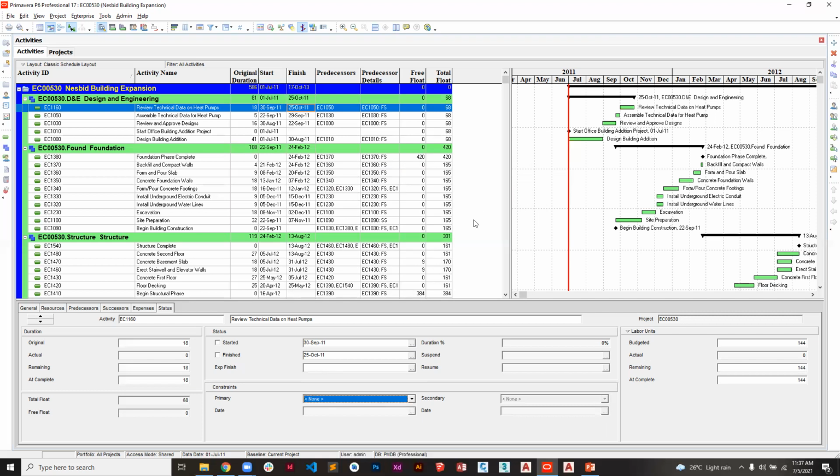Maybe what you should know is that these activities are interconnected, like they are depending on each other. The moment I put a constraint on one of the activities, it's also going to affect others that depend on it, unless it doesn't have dependents. For example, this activity was supposed to take 5 days, but now I put a constraint and it must be finished in 3 days. So now the activity that comes after is going to come after that one is done. That's why you see that other activities also get affected, because they are all linked or connected to each other.